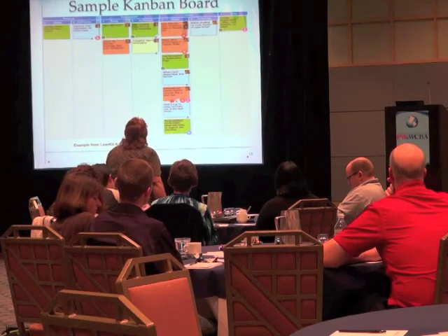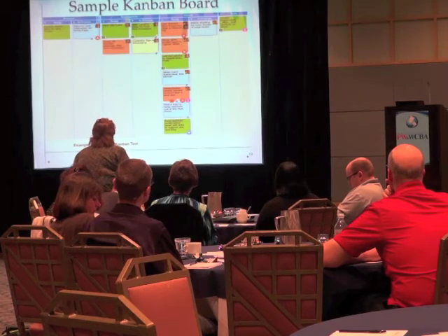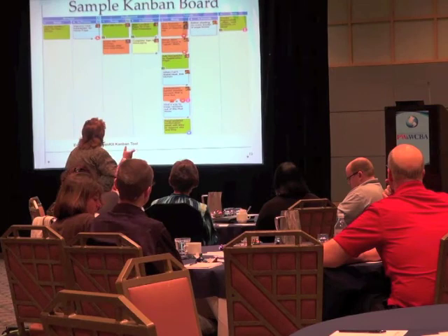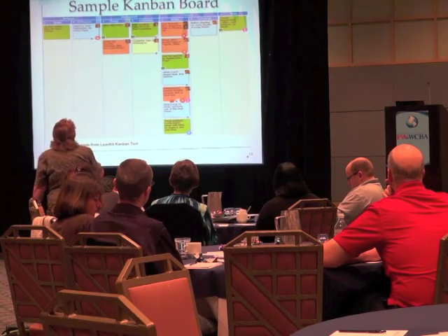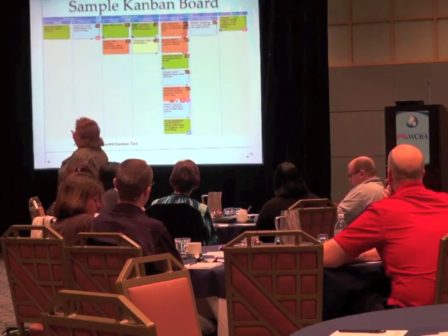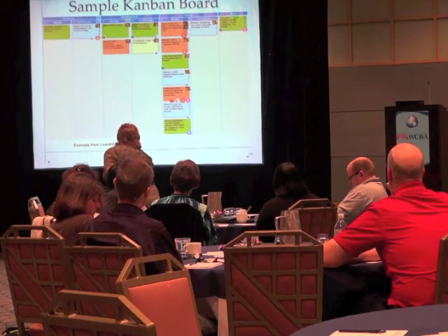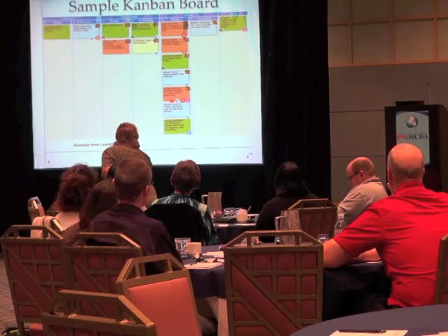You also see evidence of buffer queues here. Look at the top under development. There's a number 1, I think, under feed the ducks. And there's a 7 up in ready. So now they're using multiple WIP limits, right? So what they're saying is, we can handle 7 things in this ready queue. Up at the top in development, can you see that way up there? Oh, sorry, where's my cursor here? Where'd it go?